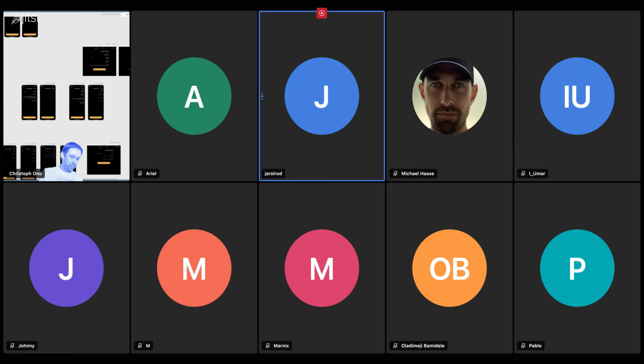The approach we've taken is, if anything blocks, for example, let's say you guys wouldn't have been able to look at that issue, we on the dev side would have moved it in, but documented this is something we need to go back in. So whenever there's a blocker, I'm trying to find any way, okay, this works, so we'll get it in and we have an issue and then we'll go back on that. So we don't have days where